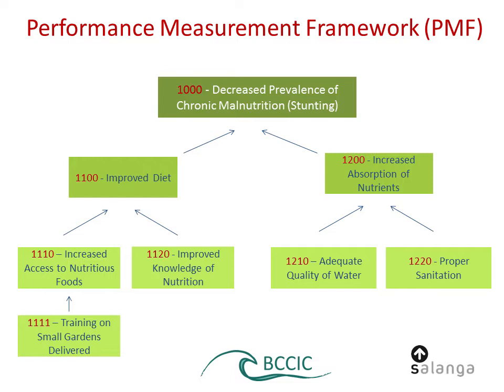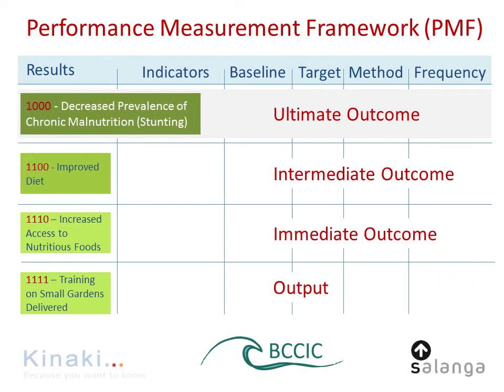Immediate outcomes are a change in the knowledge of our recipients, of the target community groups, communities or individuals. So what we want to see is that people think differently about your message, the information, or the change that you try to achieve in your project. So for example, in our case, people will have an idea how to properly access vegetables. For example, they will go through training for gardening, and they will also have an idea how to cook better.